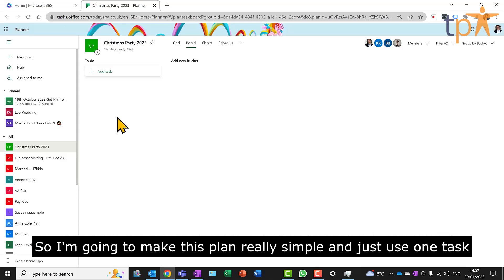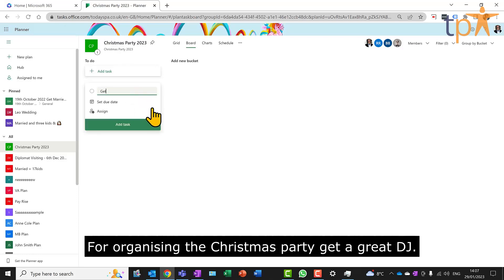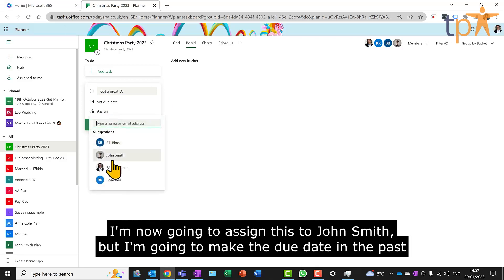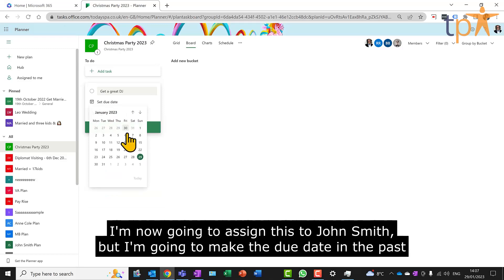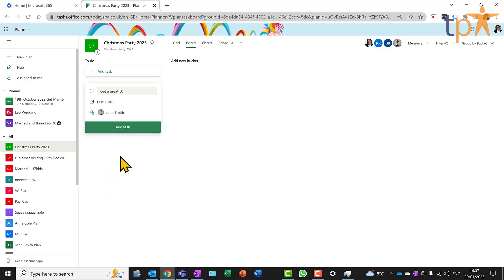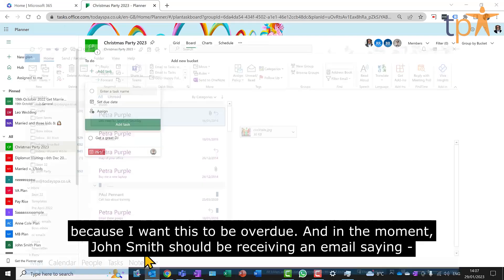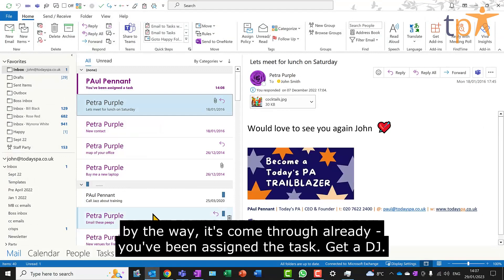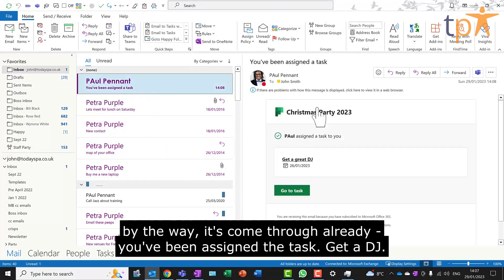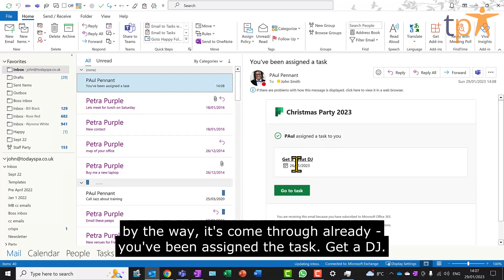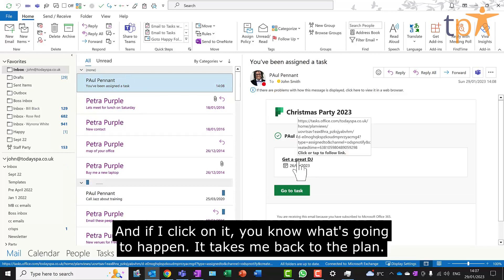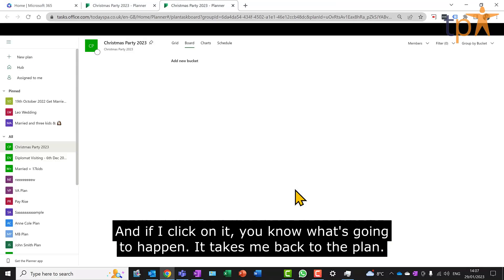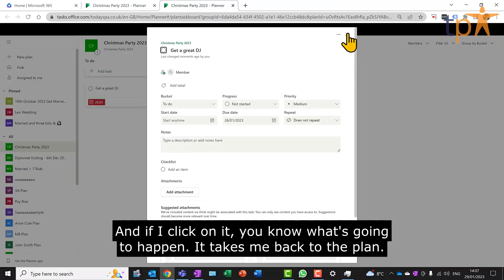So I'm going to make this plan really simple and just use one task for organizing the Christmas party: get a great DJ. I'm now going to assign this to John Smith, but I'm going to make the due date in the past because I want this to be overdue. And in the moment, John Smith should be receiving an email saying, by the way, it's come through already, you've been assigned a task. Get a DJ. And if I click on it, you know what's going to happen - it takes me back to the plan.